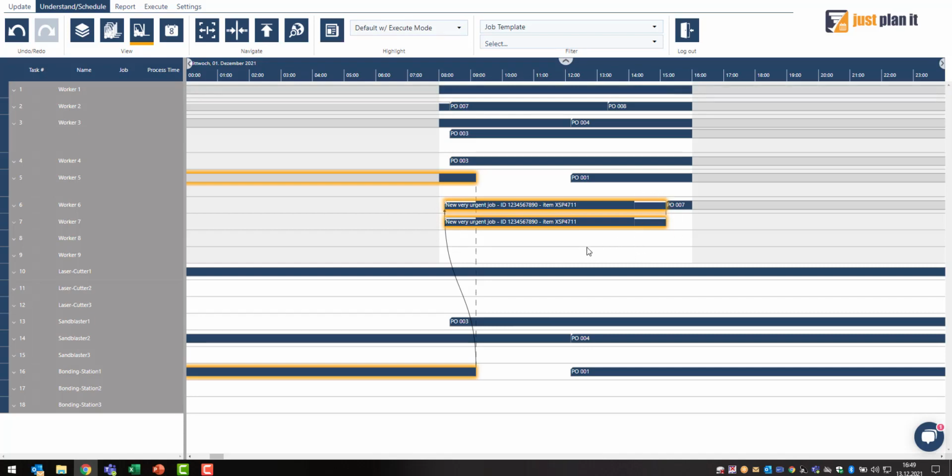So it is not the triangular way of showing these detailed times, but we want to remain it also in a bar style, and this bar has not the same height. It is slightly less high than the process time, so that you are still able to reckon, but that you are better able to realize the real start and real end of the operation, because it starts with the start of the setup and it ends with the end of the teardown.